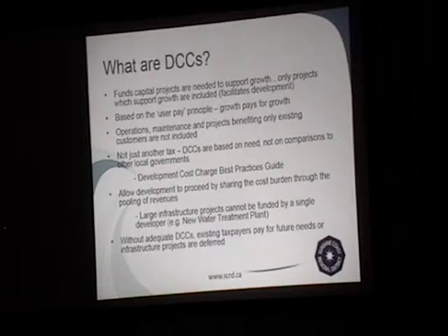And so what it allows us to do is collect fees from all development, pool it all together so that not a single developer is paying the big shot for the water treatment plant. So it helps facilitate development by sharing the cost burden through the pooling of revenues. And without adequate DCCs, either existing taxpayers, existing users of the water system would have to pay for the future needs, or the infrastructure won't be built, and essentially you can't support the additional growth.